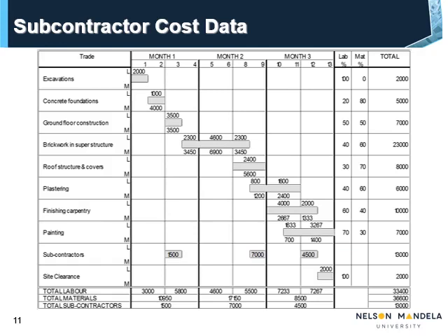Write these total amounts, that is 1,500 Rand in month 1, 7,000 Rand in month 2 and 4,500 Rand in month 3, in the appropriate columns for each month next to the total subcontractor cost, in the table at the bottom of the bar chart. This brings us to the end of summarizing the monthly cost using the bar chart. The summarized cost schedule, at the bottom of the bar chart, will now be used to prepare the budget. This we shall do on the slides that follow.